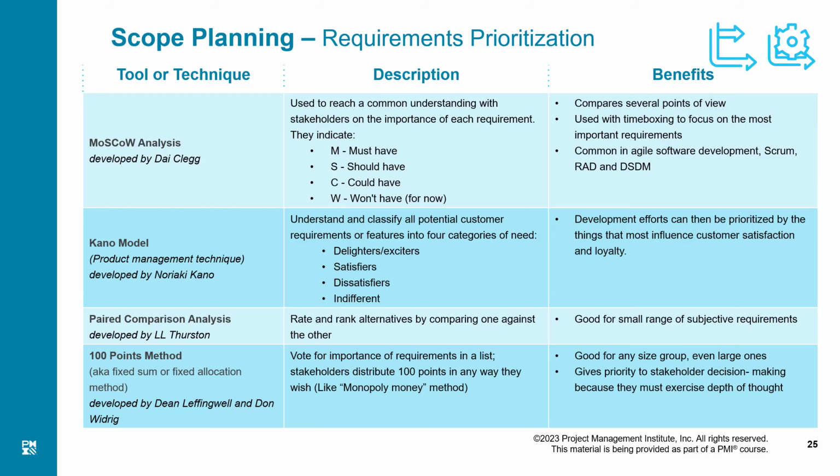Because you are dealing with a predictive project, right? Yeah. In a predictive project, you still need to discuss with them: you have given in the contract that this thing should be done, but we are not saying we will not do anything for you. All of those things, we want to do. But what is most important to you? Please let us know. Let us categorize all the requirements in 4 boxes: must have, should have, could have, and won't have.